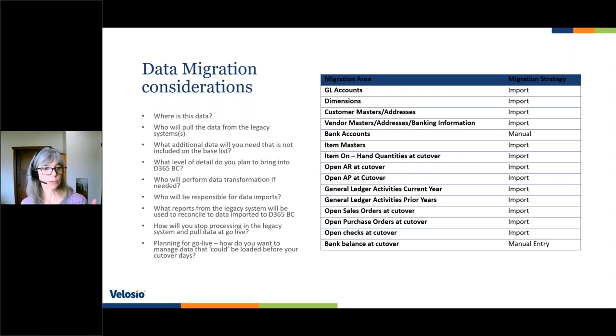The one other thing too is when are you going to do the cutover? Because you have to think about, when will my last transaction go into my legacy system? At that point, you can start pulling all of the remaining data you need to import, and you just have to be really clear with your team that they are not making any more entries, or have a plan to track who's making entries. So data migration is a big important deal, with lots of conversation and a lot of effort, but it's an opportunity to bring really valuable data into the new BC system and make some changes if you desire.